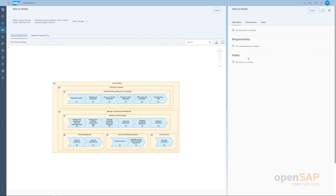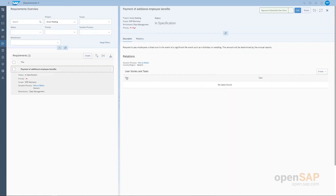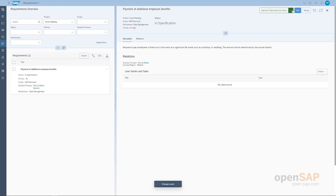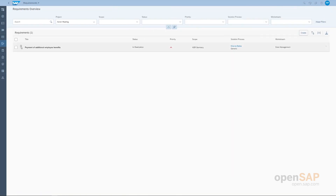The next step is for our team to look at the requirements list and either approve or postpone requirements. Going to the requirements area, we can see all captured requirements, their priority, scope, and the solution process they were created against. We can open a requirement to edit it and add more information, or simply approve it. We can approve by creating a user story or a project task — in this case, we'll create a project task. We can see the project task has been created and an icon in the overview confirms this.